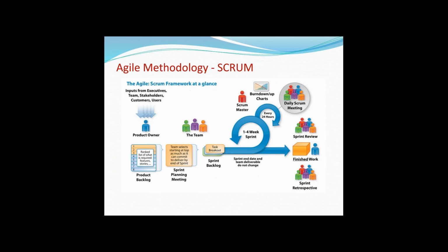So you will say that yesterday we had a design phase, and today I will be working on a registration page, creating some UI stuff. This is what you will tell. Like this, the stand up or scrum meeting gets all the updates from all the team members, and there will be a scrum master managing these meetings. If in a meeting developer 2 says that the requirements he took yesterday were slightly ambiguous and he needs more understanding, then the scrum master will coordinate and see how he can get more understanding of that specific user story. The scrum master acts as a bridge between the developers, the QA or anyone in the team, and tries to see that the team gets all the basic requirements so that they can start working on it.